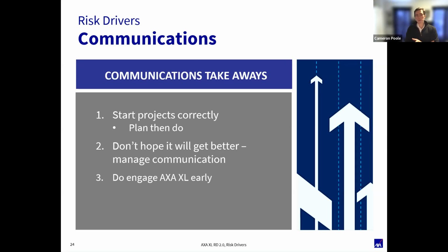No, but oftentimes by having that peer review, it doesn't increase your potential liability. It doesn't increase the risk on the project. If anything, for me, it decreases it, because what we see is that the earlier you can identify an issue on a project, the better, right? The earlier we can get at something, we can handle it proactively. The more things drag on, the more costs balloon. Things can be built over, and then there's more we need to do to go back and fix it. So to have another set of eyes there, I think it's a good thing.